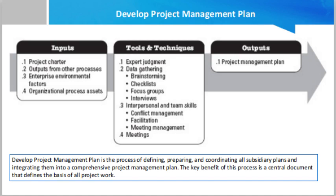It is a mistake to assume that the project plan is developed at one point in time. Although it is an output within the executing process group and forms part of the integration knowledge area, it relies on outputs from the quality, human resource, communication, risk, and procurement knowledge areas to be fully assembled. Since the project management plan consists of many other major planning outputs, it can only be assembled after such component plans have been created. The project management plan represents 13 component plans aggregated together to become the project plan itself.